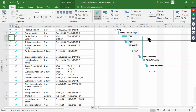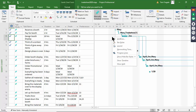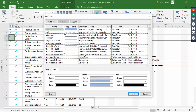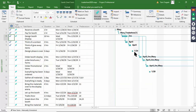Notice what happens with those longer tasks - one way you can tell it's complete is by the check mark over here, and another way is by looking at the color of that bar. The bars that are not filled in are incomplete, but the filled ones are complete. If you want to change the design of your Gantt chart, right-click on it and pick Bar Styles - then you can change this to just about anything you want as far as different colors. You have a huge amount of flexibility here.